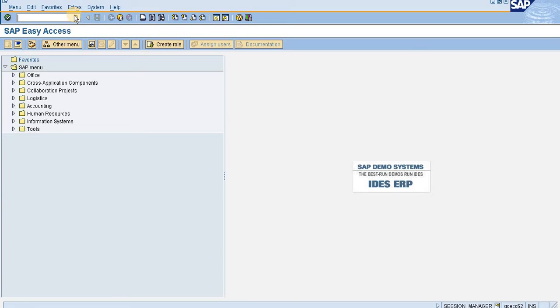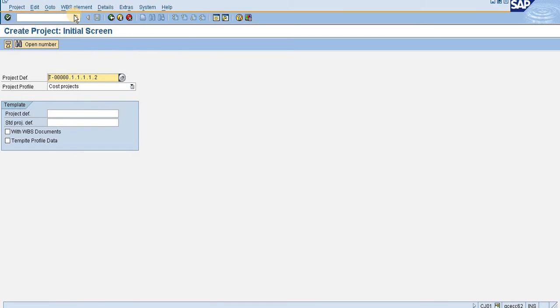So all this will be part by part segregation, and for each part WBS elements will be created under a single project. That means the building is a project, and under the same, all this work will be known as the WBS element. Now let me show you how to create a project, then it will be better for you to understand. So in order to create a project, I have to go to the transaction CJ01 as being displayed in the transaction bar above.